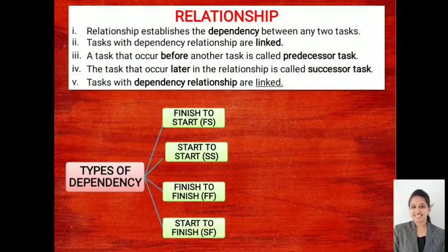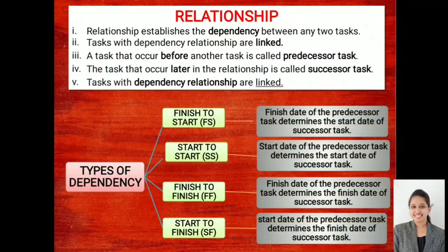Now, to understand this better, we'll consider every aspect. I'll explain with a practical example. So finish to start means what? The finish date of the predecessor determines the start date of a successor activity. That means if I have to start my foundation concreting, the predecessor is excavation. It has to be completed. Only if my excavation is complete can I start foundation concreting. So that is called finish to start. One will finish, the other will start.